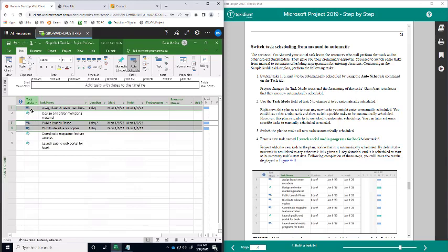One, the task mode icon that you have for tasks 1, 3, and 4 changed to this little box as opposed to this little question mark and the icon that is beside it. Okay, so that's exactly what it means. What we're trying to do is, instead of us manually keying in the start date and the finish date, this auto schedule will do that automatically for us. Now, whether those are the right dates or not, that's a different story. But at the very least, it's providing us some type of baseline.